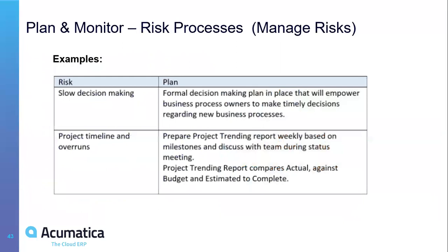So what are some of the main risks, as examples? One is slow decision making. If you ask the customer which way they want to work and they need 2 weeks to answer you, this will affect your project, and you need to think about what you do if this happens. So we finished our requirements workshop. Our consultants put the design document in place. We are all happy with it. We submitted it to the customer and we give them a week to send it back to us. What are you doing if you don't get it back? If they don't sign it until then?